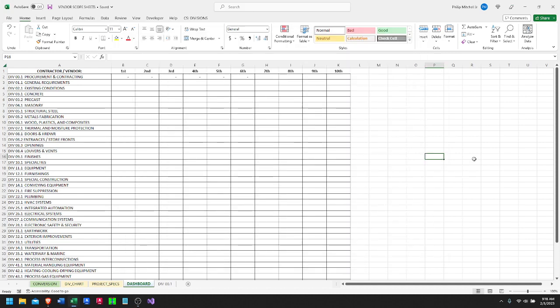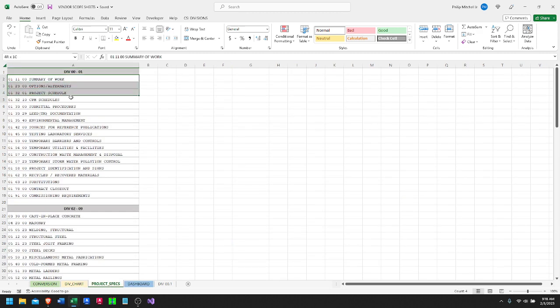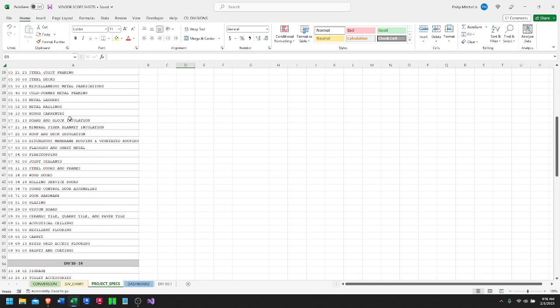Hey, these scope sheets, or scope of work sheets, or I've heard them called leveling sheets. On any project you have multiple subs and vendors, and you've got to scope them out with their bids and make sure they got everything. So I created this to help fine tune that. These are the spec sheets for the jobs. Every job's a little different. Basically, copy and paste sections from the PDF and paste them here.